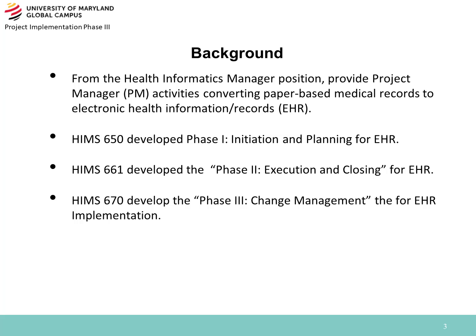In HIMS 650, we completed phase 1, initiation and planning. We delivered the description of an existing paper-based medical record system. We identified the stakeholders, project team, and project manager. We developed an EHR implementation plan. We planned for the resource requirements, human resources, finance, and project management software. Then we looked at the change management plan.